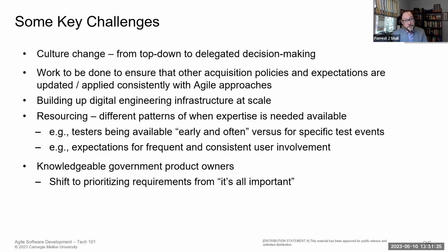There's resourcing requirements that are done, right? So that testing example, we're telling the testers now to be available early and often, so that they can have their say as you go through all these different iterations. That's a very different mode of resourcing than having all the test personnel available for some big events at the end of the cycle. And so these are, again, some knock-on effects that we're just working our way through, I'd say, in the department at the moment.